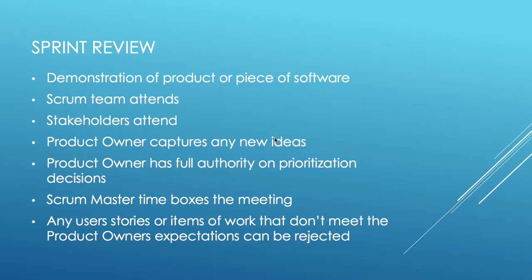Again, it's time-boxed. The maximum is usually one hour to one and a half hours — that's the sweet spot. Maximum two hours, but it is quite lengthy. It's really just: demonstrate, celebrate, and get out. And also capture any requirements that the stakeholders might have, because they are usually the business's customer as well.